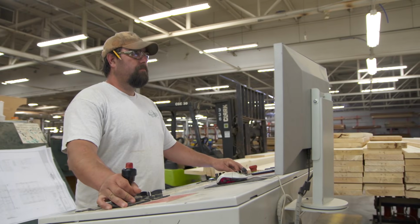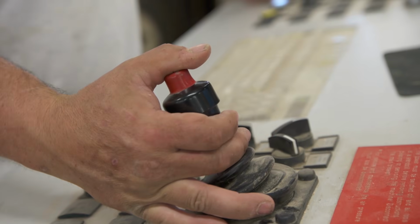What I would do is take each individual piece and measure it off a template, mark it, and then cut them and then pass them up. We got 150, say 200 rafters in this house. How long is it gonna take Duke to cut them? Probably 30 minutes. 30 minutes, wow. Well, I figure it would probably take 2 guys in the field 8 to 10 hours to cut these rafters, and they probably wouldn't be as exact as these. Probably not. These are cut to a 32nd of an inch accuracy.